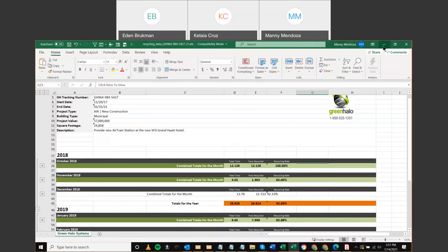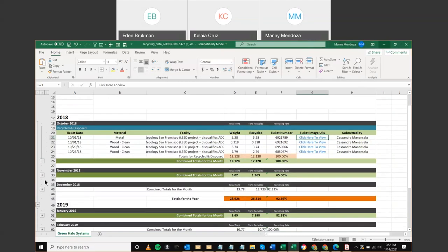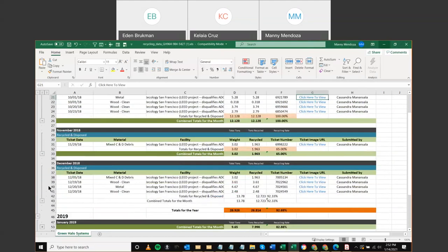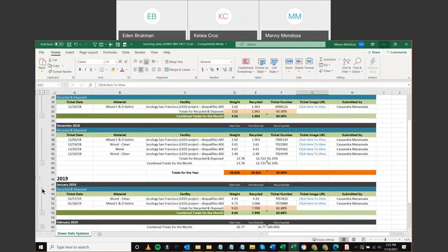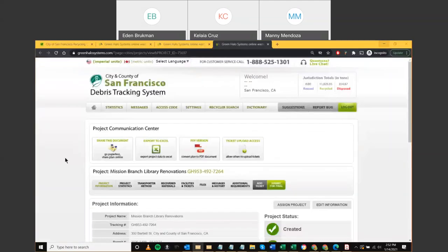Eden explains: these monthly reports are tied to payment applications received from the general contractor, as defined in Environment Code Chapter 7. The city representative is responsible for approving the plan and monitoring progress. Being able to export and save this information locally allows you to memorialize the time period and activity correlating to a specific payment application, ensuring alignment and maintaining your records.